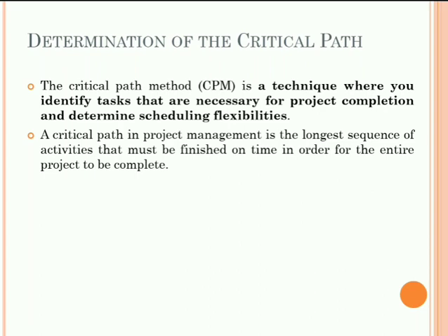What is total float and free float? Total float is the amount of time that an activity can be delayed from the early start date without delaying the project finish date or violating schedule constraints. The total float here is LS minus ES, or LF minus EF.